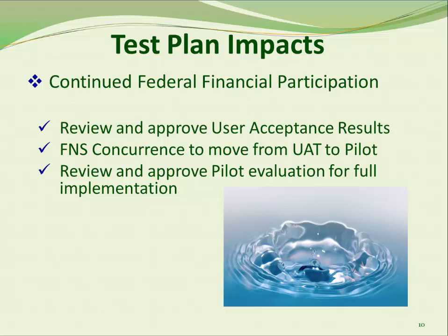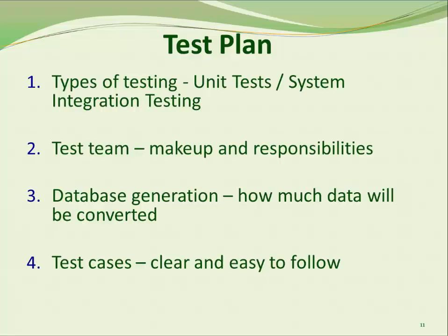Now that we have discussed the impacts, let's look at the components of a well-developed test plan. At a minimum, the test plan shall address the types of testing to be performed, for example, unit testing or system integration testing; your test team, who makes up the team, its organization and associated responsibilities; how the test database will be generated, for example, how much data may be converted; and the development of sound test cases that are clear and lead to expected results.